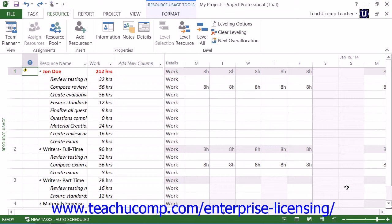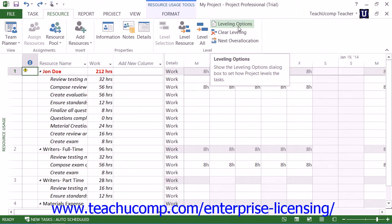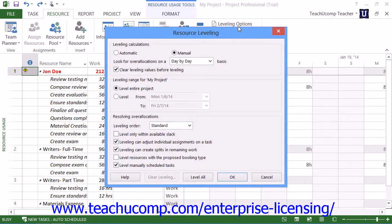To set the parameters used to automatically resolve resource over-allocations, click the Leveling Options button that appears in the Level button group on the Resource tab in the ribbon to open the Resource Leveling dialog box. This dialog box allows you to control the processes and guidelines Microsoft Project will use when performing resource leveling.